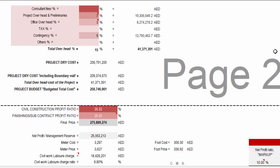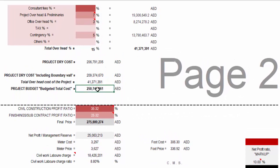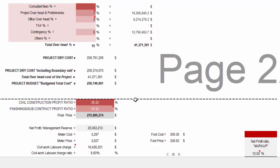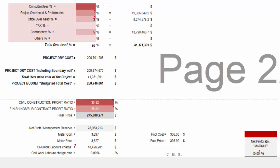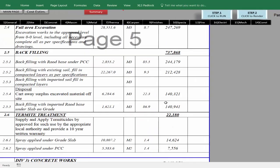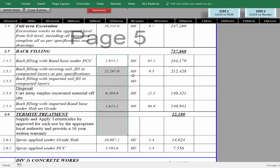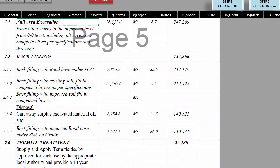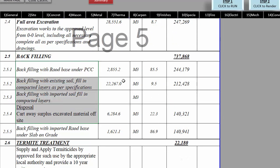At the end, CMS provides the final budget and final price for the project — the price you sell the project with — including all direct and indirect costs, with overhead and profit distributed across all project activities appearing automatically in the auto-produced bill of quantity. CMS produces a full bill of quantity automatically including all required activities, quantities, rate per activity, and price per activity. For earthwork, the excavation quantity, rate, and total price; backfilling of all types; and disposal quantities are all calculated automatically.